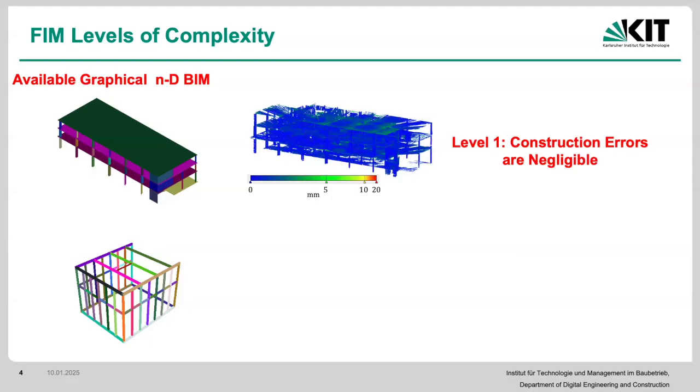If the coordinate systems are the same, in terms of the distances from the point to every surface, we would be able to see how far they lie, okay? Using that, simply, we can see if these particular points are going to be within the tolerances that we expect are point cloud measurement errors.